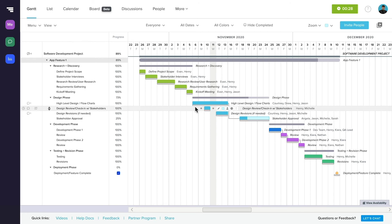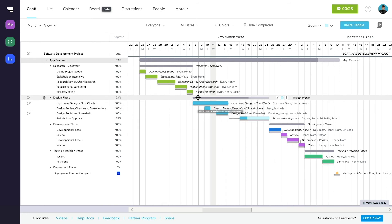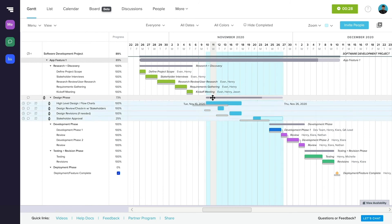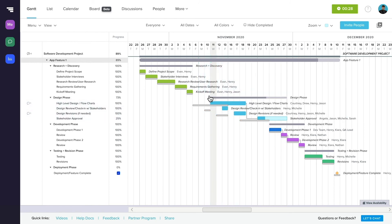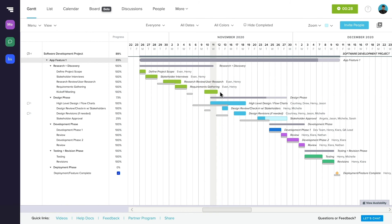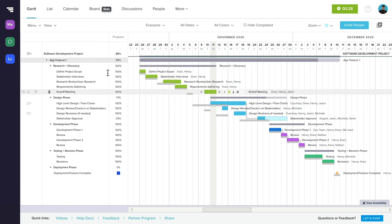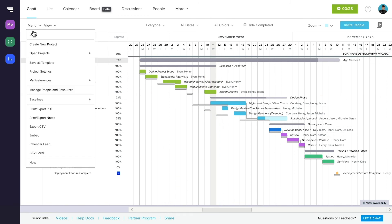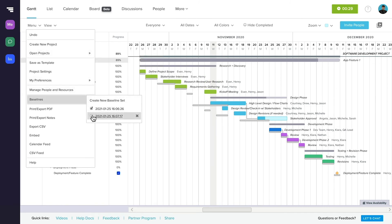When you toggle your new baseline on, it's represented by a gray bar. Use this as your timeline shifts throughout your project, to keep track of where your project was when your baseline was set. You can create as many baselines as you need, and toggle them on and off to see how your project looked at different times.